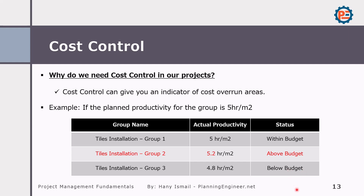If I'm a project manager and I need to terminate one of these three groups, I should definitely terminate group two because they are spending more hours than expected, making the company pay more money than required. On the other hand, if I want to give a reward or bonus, it goes to group three because they are saving hours for the company. In my experience in construction projects, we implemented a reward and punishment system based on productivity, publishing actual productivity rates every week or two so departments knew who was performing well and who needed to improve.